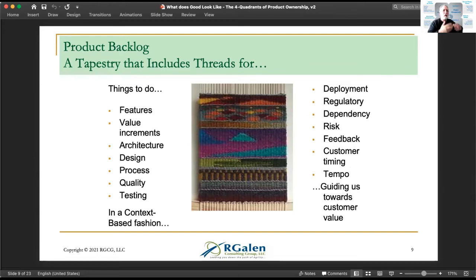If you've ever heard of user story spikes or research spikes, I think in terms of have you and your team sprinkled them effectively through the backlog in order to mitigate technical risk, in order to manage look ahead? Do you have quality concerns being managed? Do you have testing concerns? Regulatory, dependency, like I was saying, are you identifying and simplifying dependencies? Goals, unfolding it from a tempo point of view. All of those things you can see in the backlog.